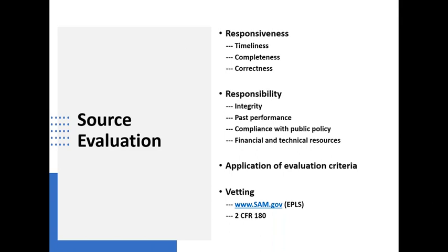From place to place, this may vary to some degree, but you get the point. You want an organization that has got a record of organizational integrity. And finally, that they've got the financial and technical resources necessary to carry out the work. Do they have a line of credit? Are they insured? Things of that nature.